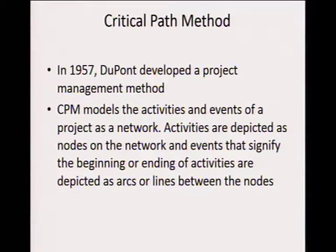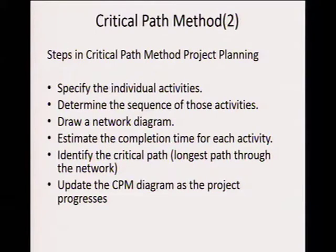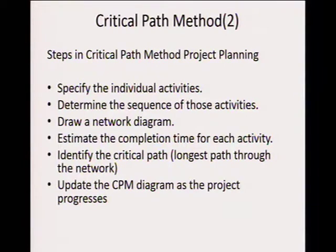Critical path methods: in 1957, a project management method called CPM was developed. It models the activities and events of a project as a network. Activities are depicted as nodes on the network, and events that signify the beginning or ending of activities are depicted as arcs or lines between the nodes. Steps in critical path methods include: specify the individual activities, determine the sequence of those activities, draw a network diagram, estimate the completion time for each activity, and identify the critical path — meaning the longest path through the network. The critical path is very important because should anything happen along it, the whole project is delayed. Finally, update the CPM diagrams on the project.